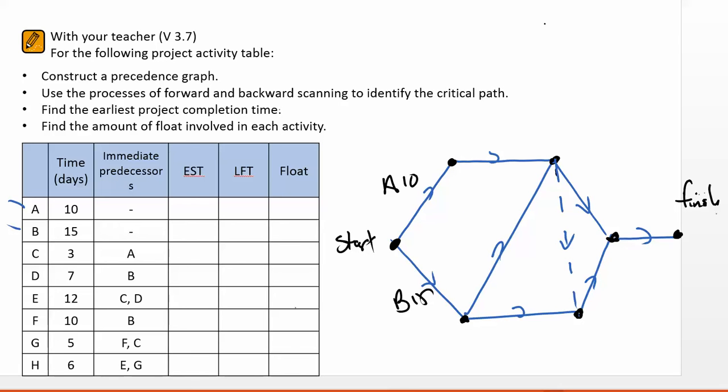down to the right. Now, you'll notice that activity C only requires A, so I'll put that up in this branch. B flows on to two different activities, D and F. So B, I'll be putting immediately after B, and that will flow on to activity E. So D, 7 units, and E will flow here, 12. Now, B also is a predecessor of F,